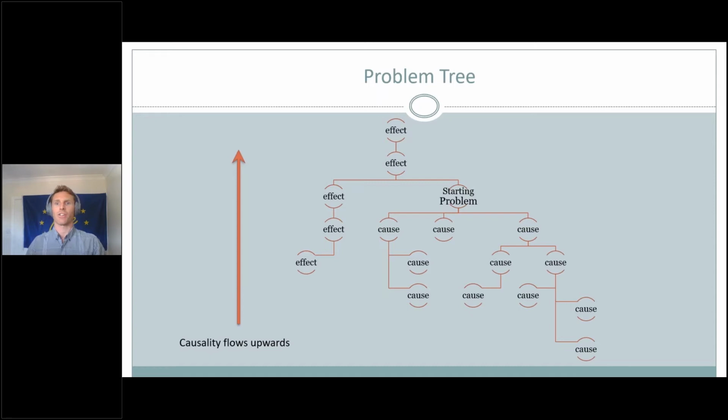So you will need to have your stakeholders along with time and space. As you would probably normally do this in a room, and at the moment it's a little tricky, we would suggest using mind mapping media, virtual software, share screen interfaces with your stakeholders to get them engaged. So the problem tree analysis is designed to help you understand the wide range of causes of your problem and their causal links. A good system we have used is cards or post-it notes, which can be moved around, grouped, and causes mapped as shown in the tree. I will show this process in practice a little bit later.